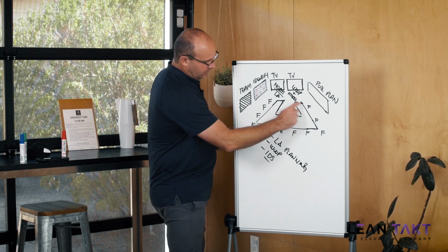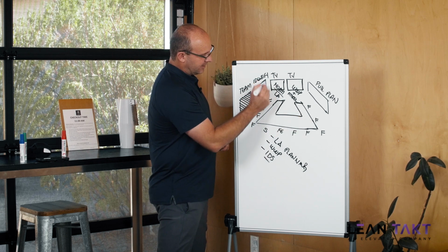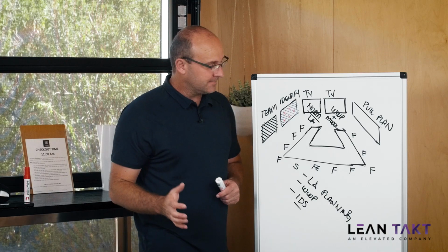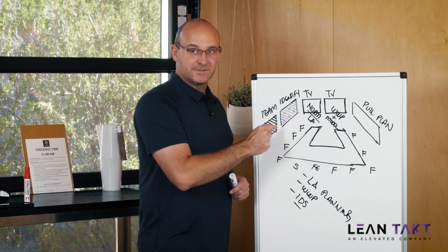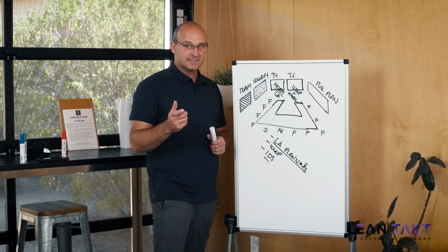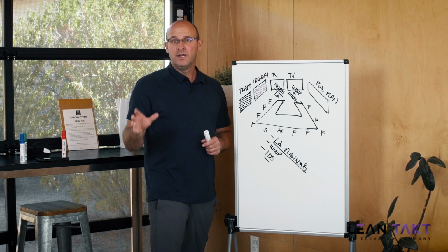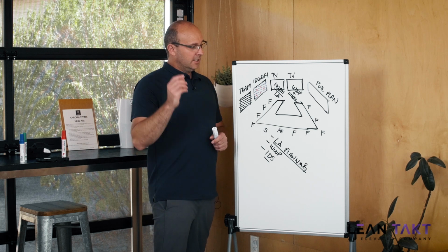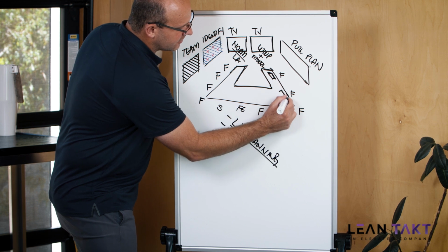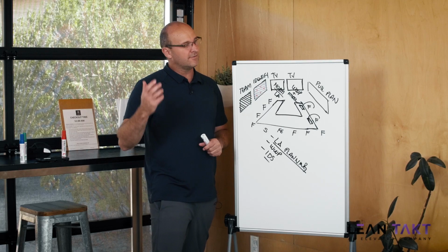These wonderful, beautiful human beings in here will see the problems and then say, okay, we know about these problems. Let's go ahead and make, oh my gosh, this is so good, a realistic plan based on the reality of the job site. So you'll go through and you'll look ahead 6 weeks. And this is the key. In this meeting, actually time it. Say, all right, I'm going to give you 5, 10, 15 minutes, trade partners. And you can even have the look ahead plan filter from the actual norm level takt plan printed out in front of the trade partners and say, hey, we got 5, 10, 15 minutes.